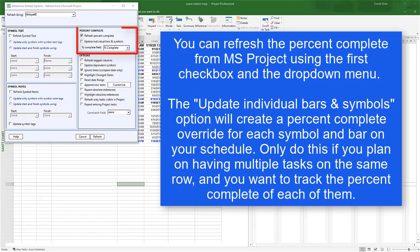On the top right, you've got your Percent Complete options. The first checkbox will refresh the Percent Complete of your Milestone Schedule from whatever field you choose with the drop-down. The second option, Update Individual Bars and Symbols, will create a Percent Complete Override for each symbol and bar on your schedule. This will allow you to have multiple bars on the same row with different Percent Complete values.